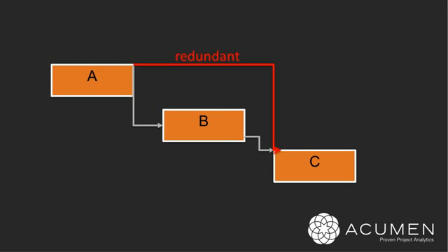With the introduction of more collaborative scheduling tools, this whole issue of logic redundancy and overcomplexity and unnecessary logic is becoming more of a challenge. It makes schedules harder to understand, it makes them more complicated. It even has a negative effect on the likes of risk analysis. So the ability to remove this redundancy is very, very useful.